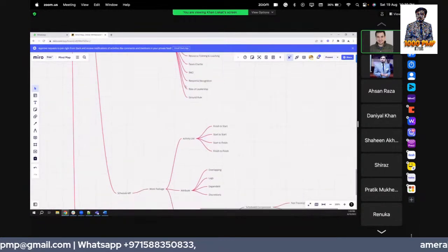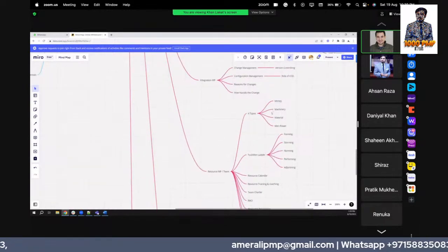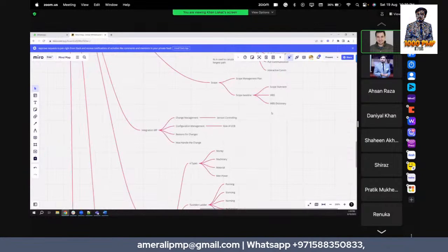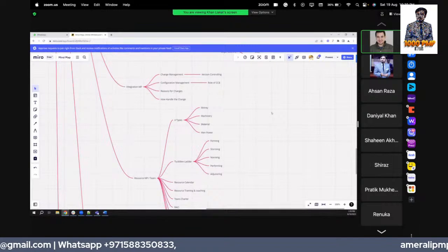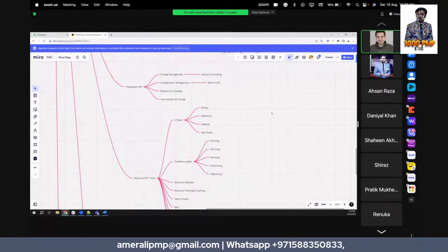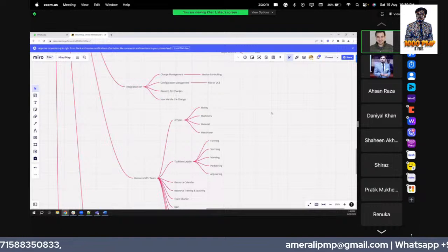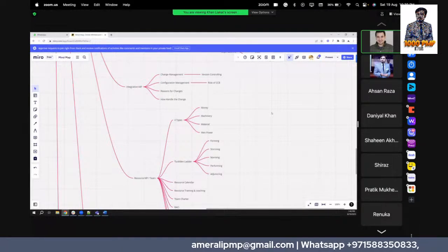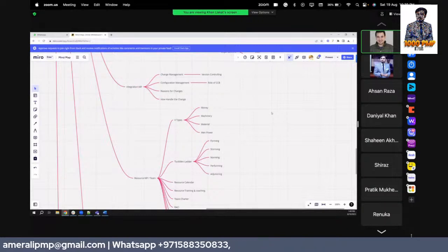And then we have the integration management plan, which requires change management. For example, if we have released something and now we want to bring something new, it comes with the change management plan. Through this, we control version control. It could be small version controls or major version controls, and configuration management, because in some cases you don't need to change anything in the core, as in software development, where we just do things with configuration management and the role of the CCB, which approves those configuration changes.